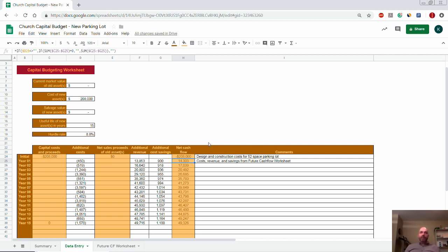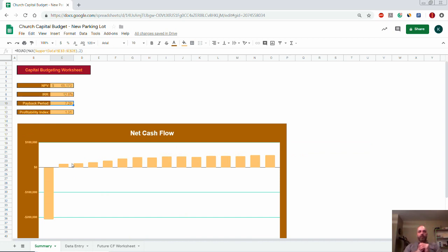These are long-term projects, right? You ain't gonna earn your money back next month, next year probably. You have to have on your long-term thinking cap when it comes to this. But eventually, if the project does what it's supposed to and is a profitable project, you will earn your money back. Like I said, it's pretty straightforward. It gives you even a fractional year there. 7 years, 0.29. 0.29 is roughly a third. So 7 years and 3 months and 2 weeks or something, I'm just guessing that. But that's when you would expect to earn that initial investment back.